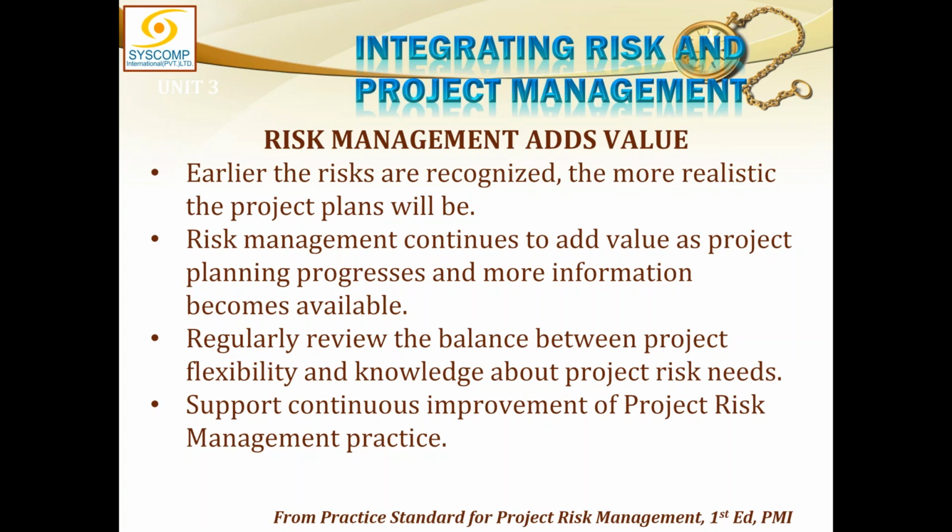Risk management continues to add value as project planning progresses and more information becomes available. So risk management should start as soon as possible and should continue throughout the life of the project, because with the changing circumstances, risks are also changing. So I cannot stop identifying the risks and processing the risks in planning. Yes, of course, things will heat up in planning, but then this will continue. We will keep processing the risk data, keep identifying new risks, and keep analyzing the existing risks and monitoring them. So this is going to continue till the project finishes.